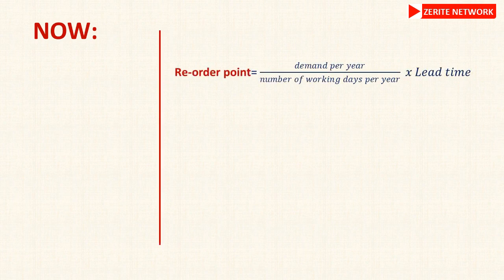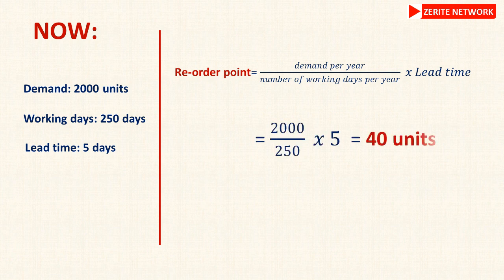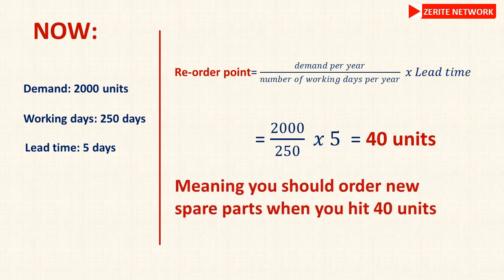To figure out your order point, use this formula: demand per year divided by number of working days per year, multiplied by the lead time. In our example, demand is 2,000 units, working days are 250, and lead time is 5 days. So: 2,000 ÷ 250 × 5 = 40 units. This means you should order new spare parts when your stock hits 40 units.